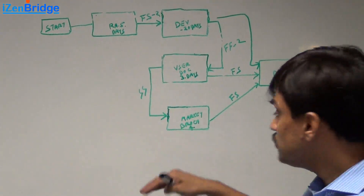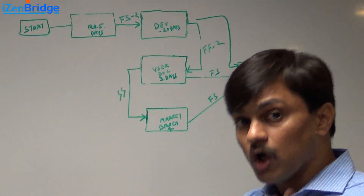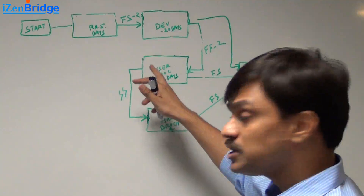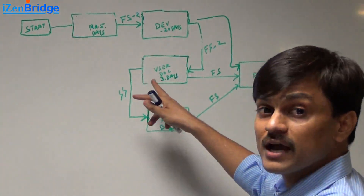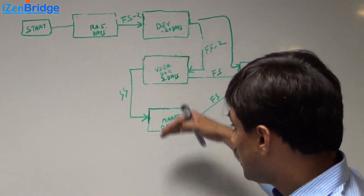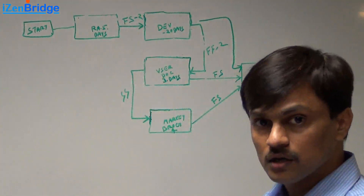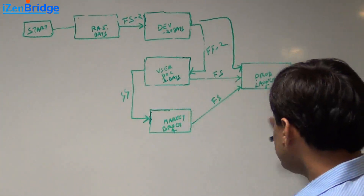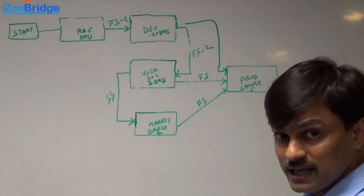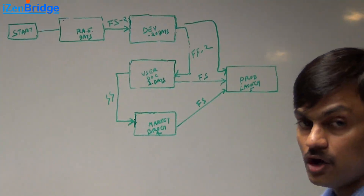Along with user documentation, we also want to start a marketing brochure preparation activity because the final product will go along with the marketing material. The marketing team is just waiting for the user manual team — whenever the user manual team starts their work, they also want to start. So it's a start-to-start relationship with no lead or lag. Finally, we have a product launch activity which will take 5 days and requires all three things to be ready — development, user documentation, and marketing brochure.